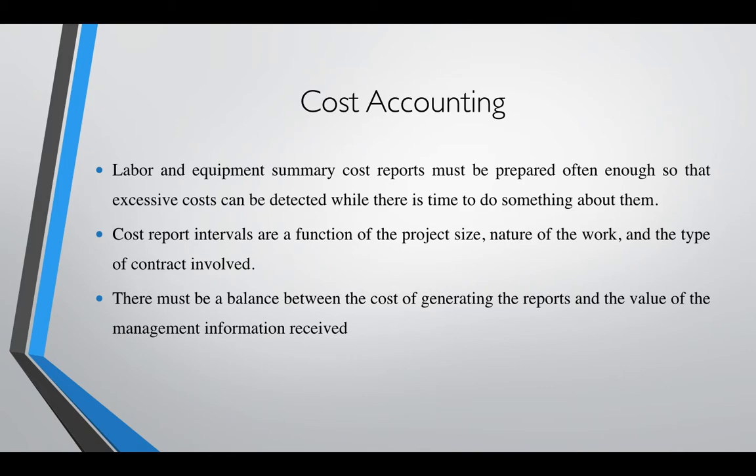So in a simple cost control system, the labor, material, equipment, and subcontract costs are basically compared to the estimated cost for the project or sub-projects to determine if the project achieved the target cost. By adding the appropriate amount of indirect overhead, usually by using a percentage of cost, the contractor can determine if the project was profitable. That is, revenue exceeded the total of the direct and indirect cost. And that is on page 331 of your textbook.